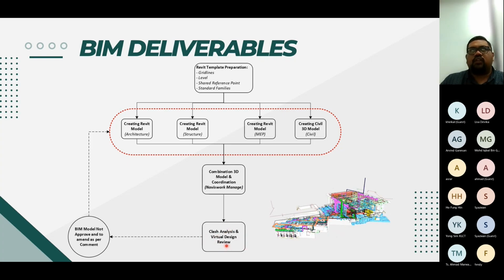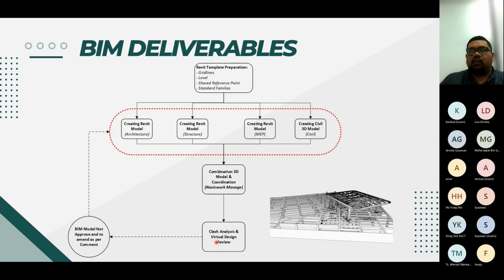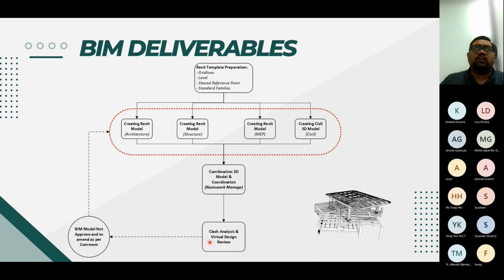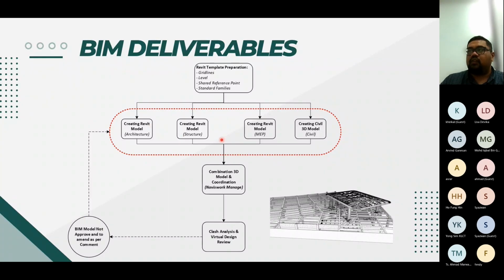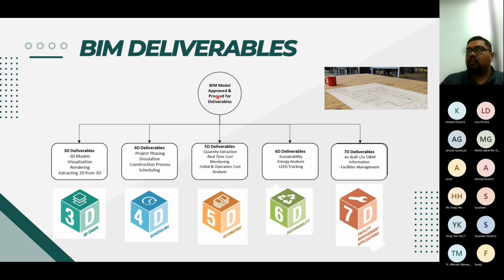Okay, so in the BIM workshop, if it's JKR, we call it the Bengkel BIM. Like in my project, in Line 2 before this, they're using VDR, virtual design review, or virtual construction review, or something like that. So if the model is not approved internally, we need to go back to amend. If the model is approved, the next stage is model approved and proceed for the deliverable.